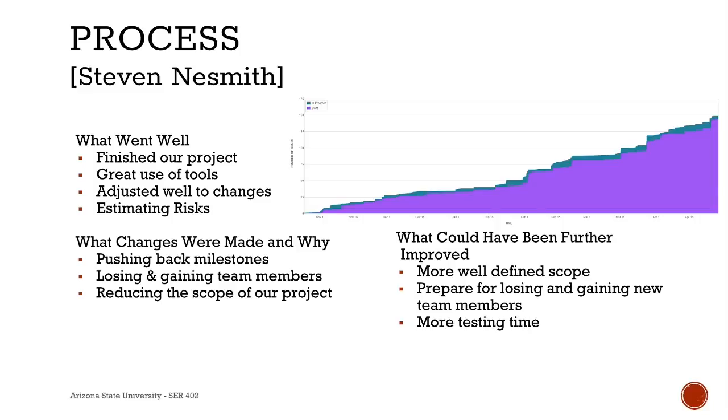We would give ourselves more testing time. Our testing phase was rushed and wasn't done effectively, as we had liked. We would set up a testing plan to follow and give ourselves the proper time to find and fix code bugs and problems.